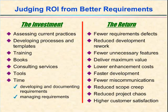Many of these benefits are hard to quantify. I don't know exactly how much it saves you to reduce miscommunications on a project by, say, 40%. If you want to quantify your return on investment, you need some baseline data — for example, how much you spend on average to fix a customer-reported defect that you can trace back to an incorrect or missing requirement. Without such data, you can't possibly quantify the ROI. However, even subjective or anecdotal experiences can reveal the benefits of improved requirements practices. The ROI only has to be above 1.0 to make it worthwhile.